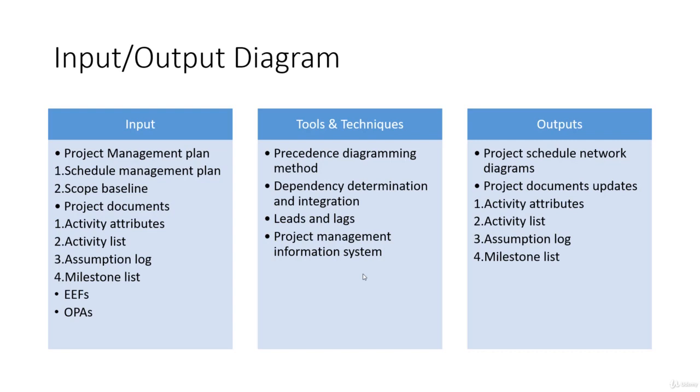In case of software, let's say we first need to deploy some kind of software and leave it for 48 hours before we can do something else. So this 48 hours here is our lead time. Similarly, we have the lag time. Lag time refers to the time after an event. So let's say we needed 48 hours after a certain thing. That will be your lag time.